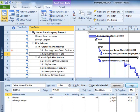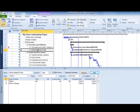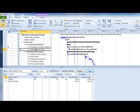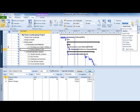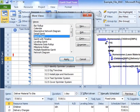Split views are useful for analyzing a project. For example, a project manager may want to evaluate all task relationships in a schedule. The split view makes this easier. In the Split View command group, select the Details drop-down menu and select More Views, then scroll down to Relationship Diagram and choose Apply.